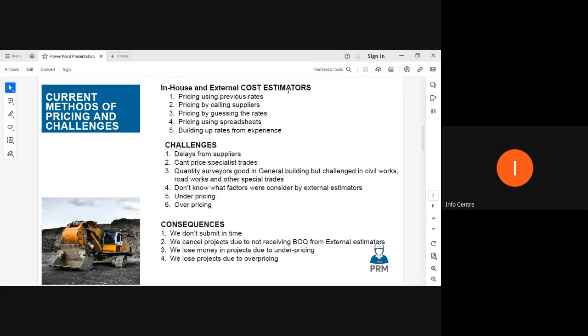So far, who gets hired permanently, who doesn't get hired permanently, what our fixed costs are, and what our variable costs are. And obviously, that's not a way to run a business because very quickly you'll realize that when you do win that tender, the problem that you're often going to encounter is that the rates that were supplied in some instances are too low and we lose money. The other one, number five, is that we underprice because obviously sometimes we guess, sometimes we don't know the price. And lastly, we overprice. So we are not even considered for evaluation because we are too expensive.